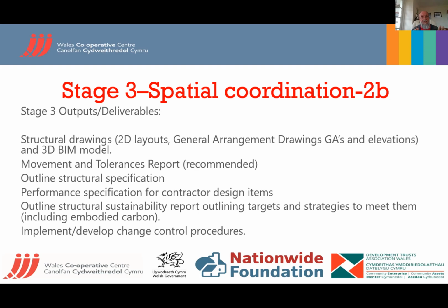Whereas if you want it exact for a timber frame going onto something, you haven't got that tolerance. So you set your own tolerances over and above, or you could just have a performance test to British standard, but it might not be accurate enough for what you want.